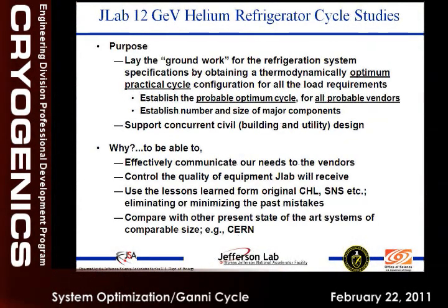So what is the purpose? It is to lay the ground. Because first, we have to build the civil facilities like buildings and the cooling tower. All this has to go out before we have a design. We don't know how big it is, how much power we need. All these things have to be specified way before we design it. The compressors, the cold boxes, and the heating system come way back, but we have to commit to it.